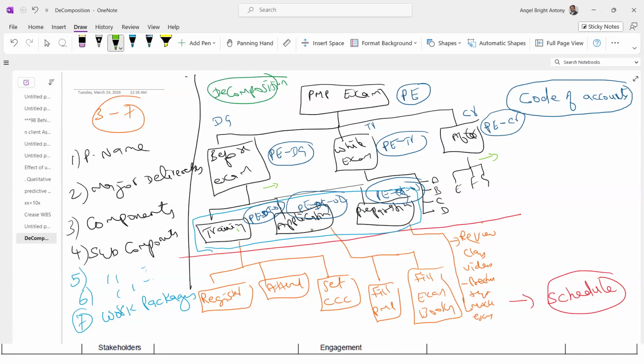Here, assume EFG is not the lowest level. It has to be further decomposed. Since we are in an early stage of the project, this is far future work. I cannot decompose it now into further details, so I will leave the decomposition at a higher level.